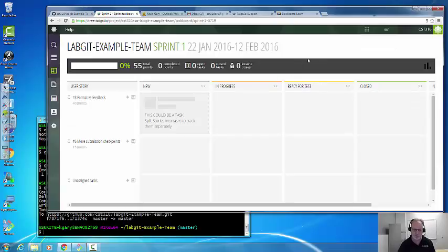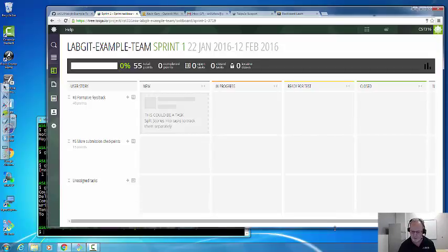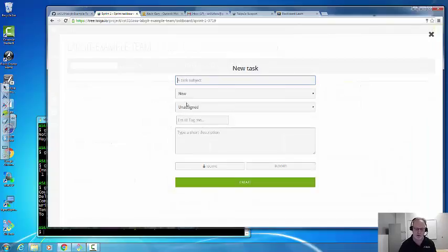And what you'll see in this view on the sprint task board is that starting point talked about in your notes. I have the 2 user stories down the left side. Taiga automatically gives you one called unassigned tasks. That is a way to do these 0-point stories, meaning if you have some tasks that you want to do, but they don't contribute to story points, you can go here and create a task.